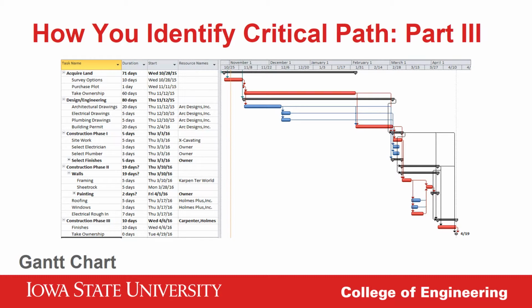As engineering managers, many of you are probably familiar with this type of project tracking. If you use scheduling software such as Smartsheet, Primavera, or Microsoft Project, which, by the way, can generate network diagrams to use as critical path method or PERT tools, you can assign costs to resources and resources to each activity. This information being automatically disseminated through the entire activity list helps identify overscheduled resources, so the project manager can work to rearrange the schedule in a way that will improve the chances of success later on.